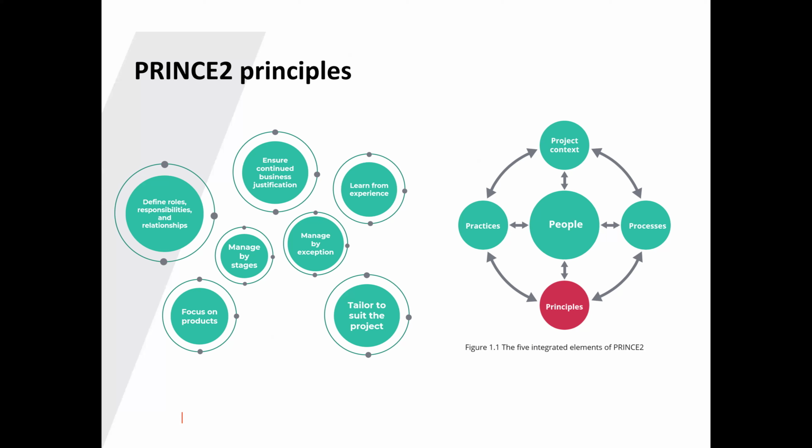So in this particular RACI, what we're saying is, let us have clear and defined roles and responsibilities. Who is responsible for this? Who is accountable for this? Who are we consulting for this? Who are we just informing for this? Okay. Take the PM/ADM training today. Who is responsible? Ayo is responsible. Who is accountable for it? Olawumi is accountable, because if it doesn't hold, you will go and meet Olawumi to say, Olawumi, why is it not holding? Who should we consult? We need to consult Deji on the timing and all of that. Who should we inform? We just need to inform Lady Pat. Does that make any sense? So you can see that on this particular project, we've got who is responsible, who is accountable, who should we consult, and who should we inform.